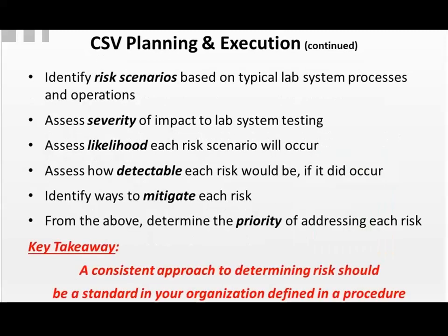You want to identify risk scenarios based on typical processes and operations in your environment. You want to look at what's the severity if a specific risk does happen. So say you identify 10 different scenarios where the system could be at risk, it could fail.